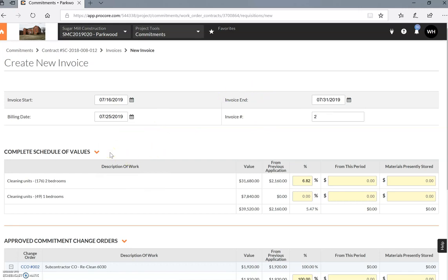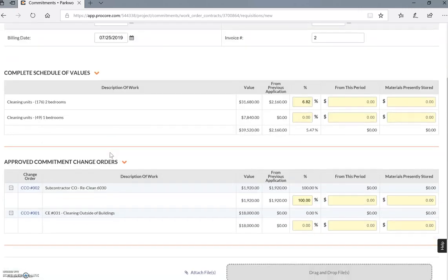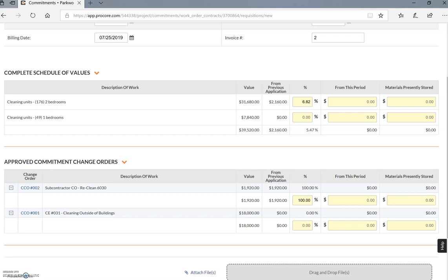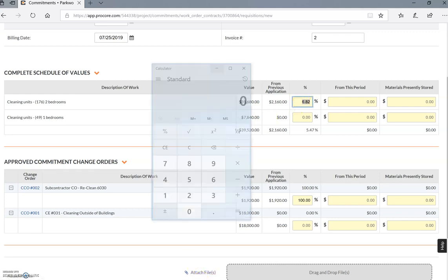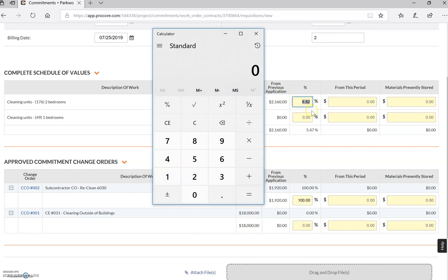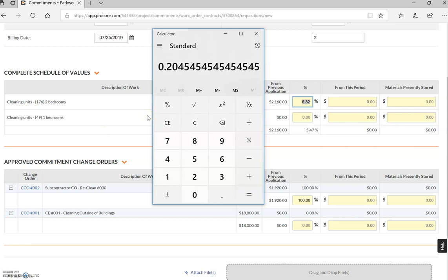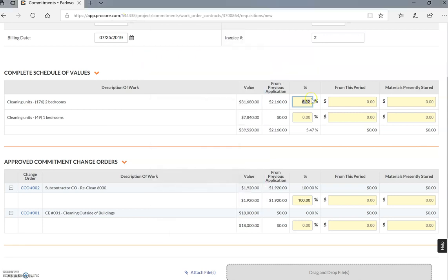The way that we've broken this down is to make it as simple as possible. For this one, it's actually a cleaning contract and they will be doing a total of 176 two-bedrooms and 49 one-bedrooms. This is a hypothetical example, but what I'm going to do here is a simple calculation. If the first units were 12 and now they've done another 24, so it's 36 units divided by your 176, so you have now done 20.45%.